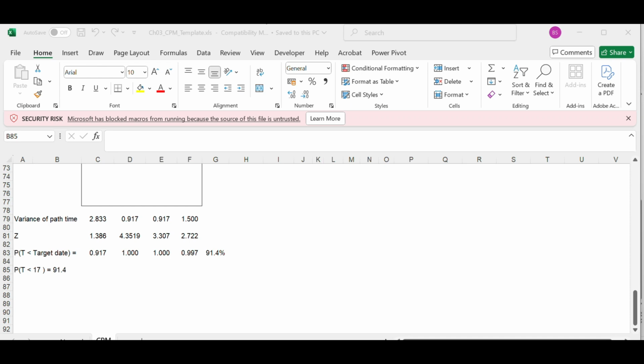Next is the preliminary estimation method. Here, the budget authorization decision can be taken. It is also a parametric cost estimation method with an accuracy of plus or minus 20 percent. Here, the cost of estimation is a little more, and we have a less aggregated and more disaggregated estimate. It is neither a top down nor a bottom up approach because it's a mix of both approaches. It's used in the macro planning phase.